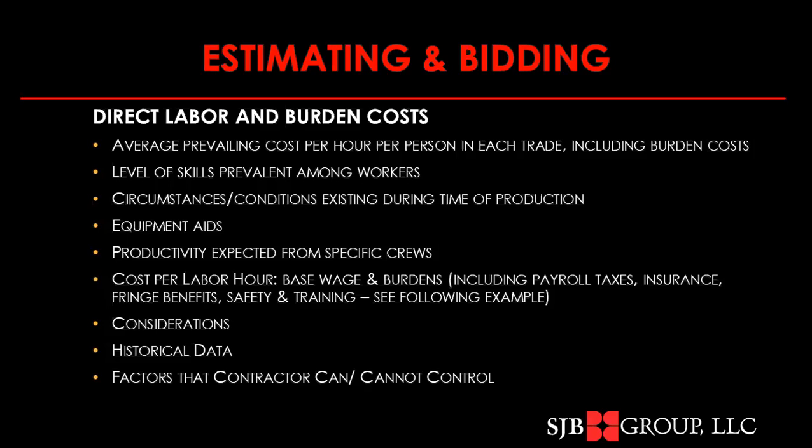Some things are outside of the contractor's control: some details of the work, plans and specifications. How much repetition and quantity are required for the project? Again, plans and specs. Your weather conditions, to a large degree, site conditions, working conditions, and the quality of the owner documents.